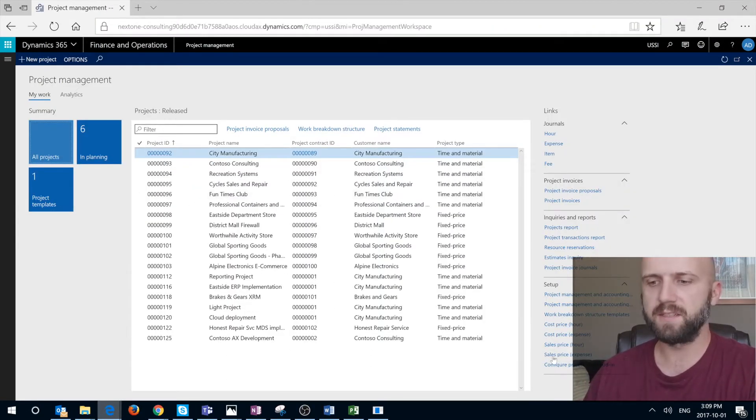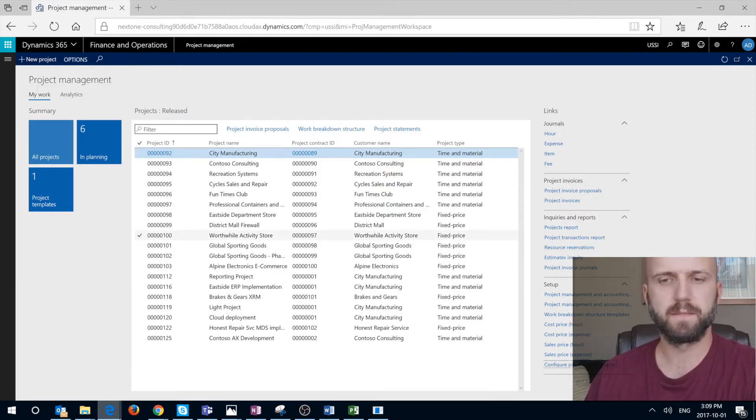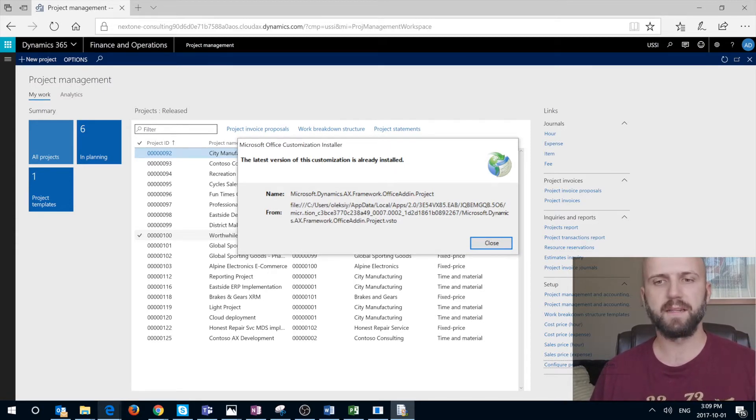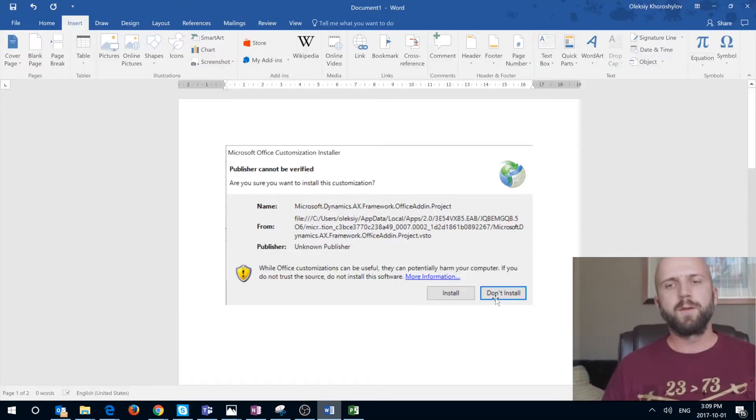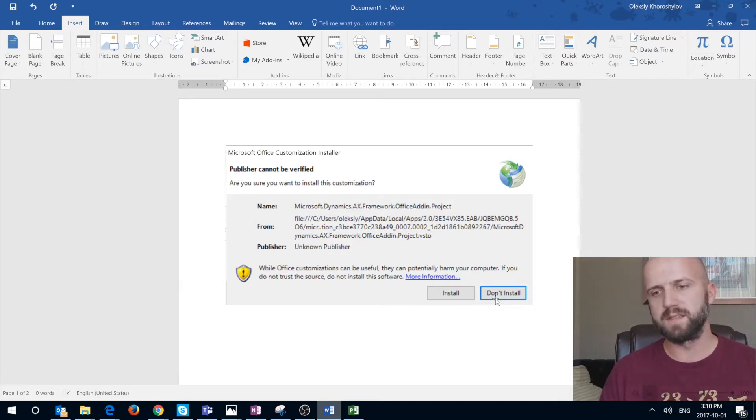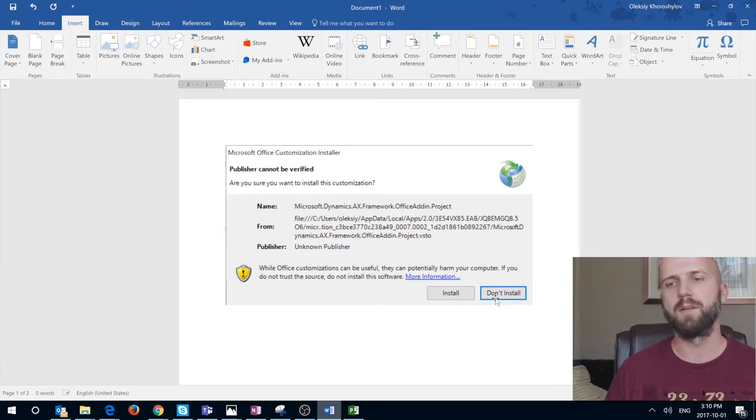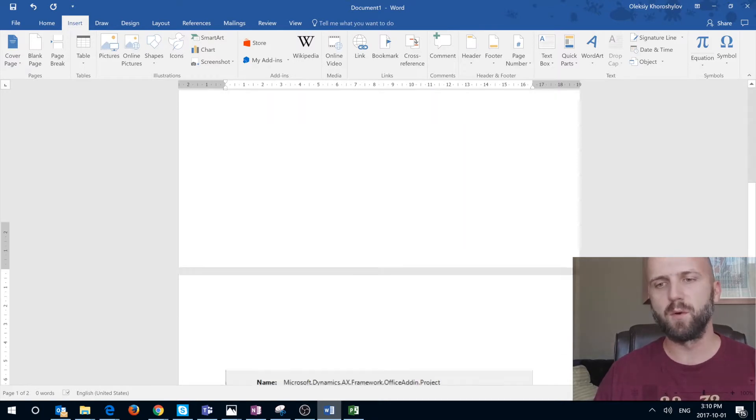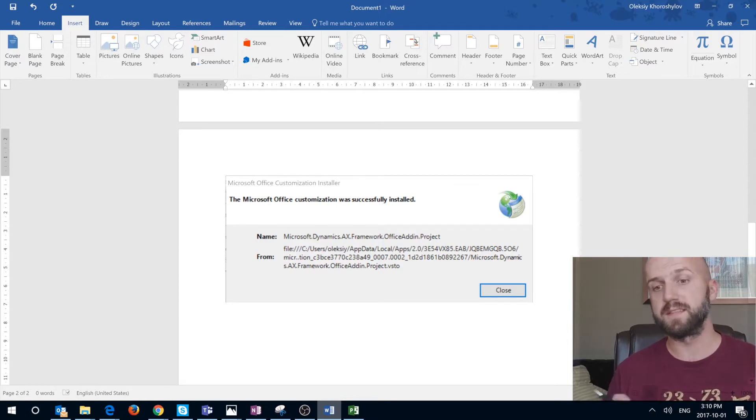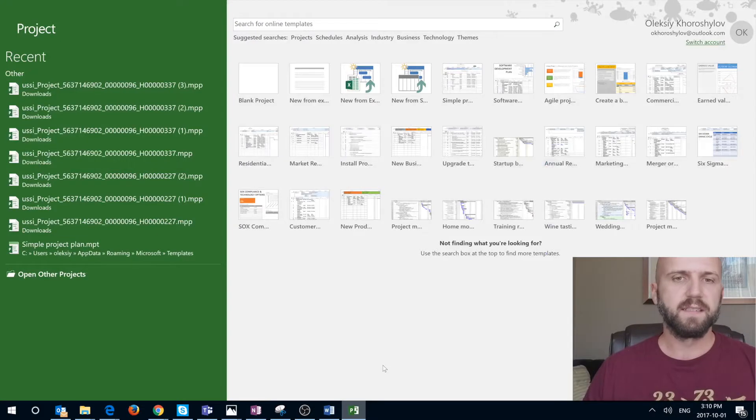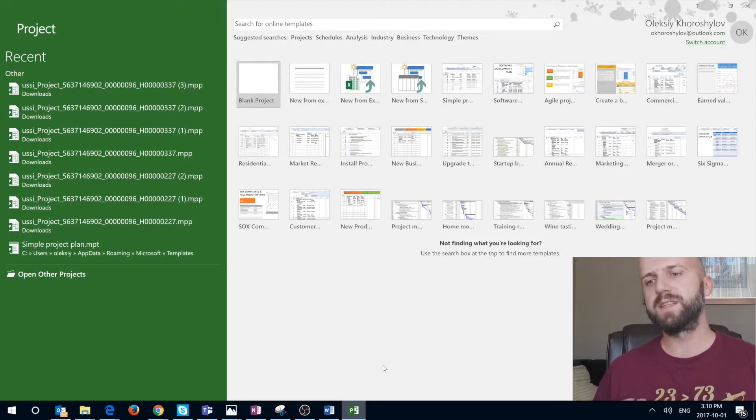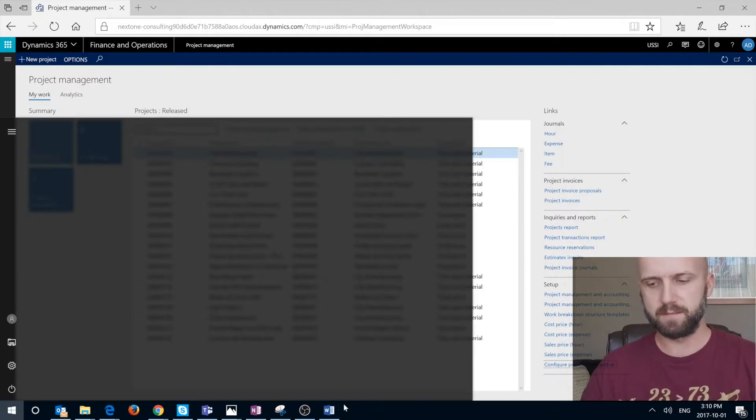Once I'm in Edge I'm going to click on the same link, open that file and go through an install process. In this case because I have already installed the client I got this message that the latest version of this customization is already installed. If you're doing it for the first time you're going to see a message asking do you want to install this plugin. Once you successfully go through installation process you should get this message that says your Microsoft Office customization or add-in was successfully installed. In order for it to take effect you need to restart your Microsoft Project client. So close it and open it again.